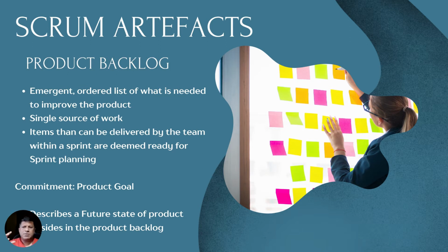And for those items that are ready, they will come up with what we call the sprint goal, correct? And to meet that sprint goal and to understand what value we can deliver by accomplishing it, they start pulling the work from the product backlog into the sprint backlog.